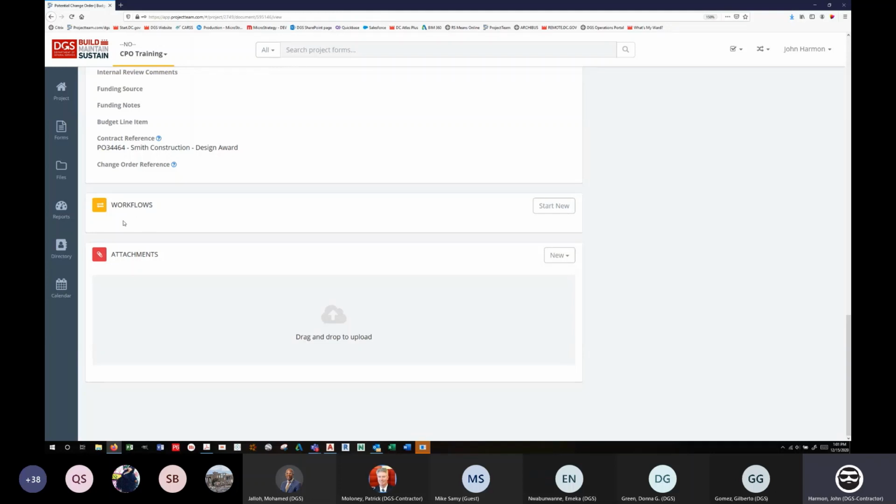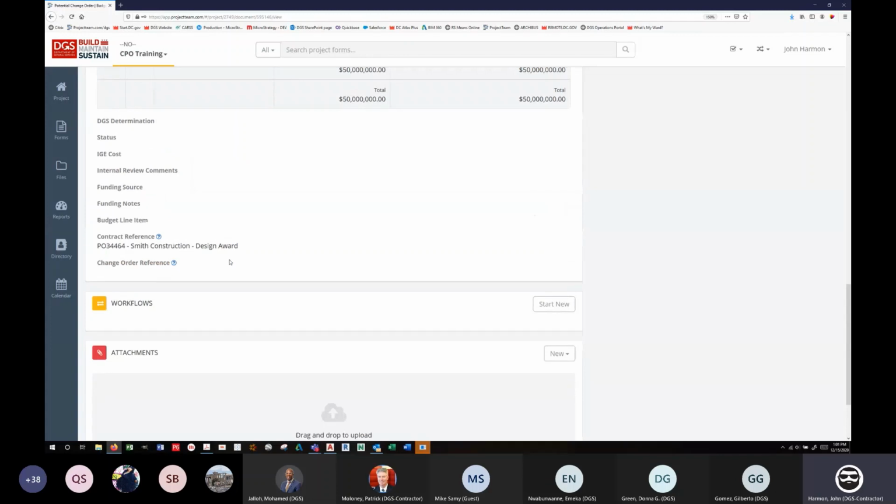And then once you take action on the workflow, if you are rejecting it, just status it as rejected, put the reason why, and then cancel the workflow. It'll stop it. It doesn't go any further. It's rejected. If you're going to acknowledge it, it's going to become a change order. You're going to go in your workflow, you're going to pass it. And then once you pass it and give the notes that you acknowledge it, it's going to go forward to your EPM for their sign off. Once they pass it, then it's approved. If they hit cancel, then it's canceled.